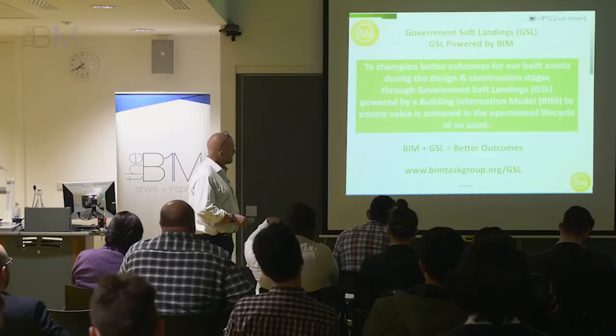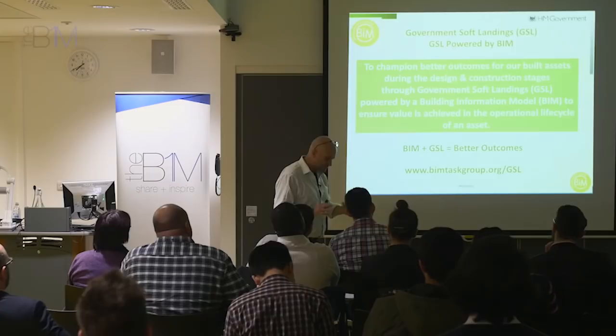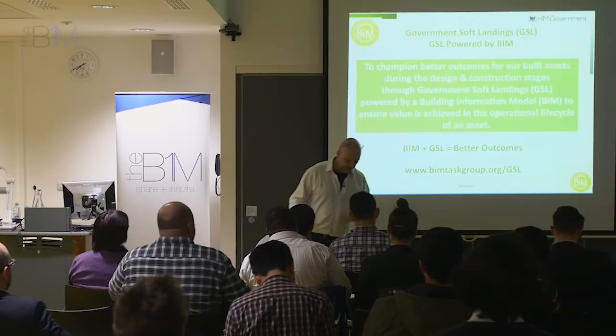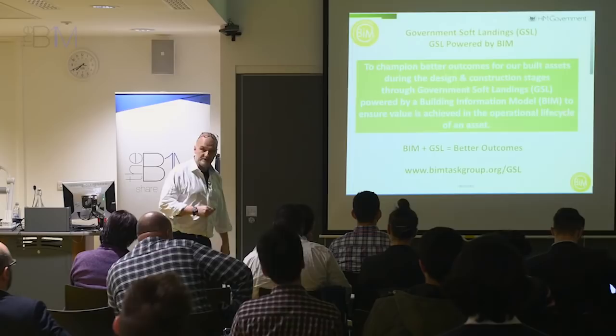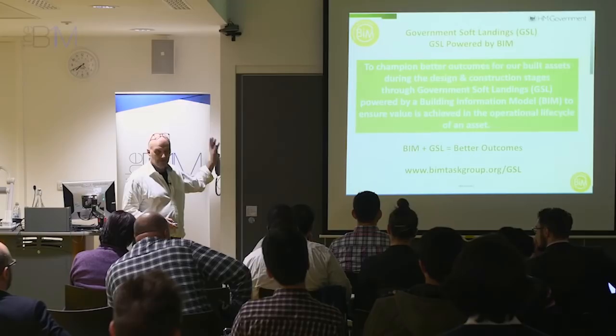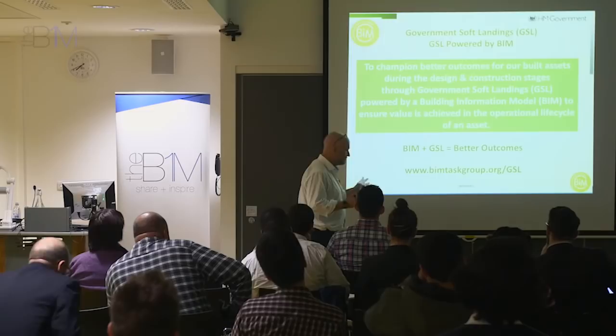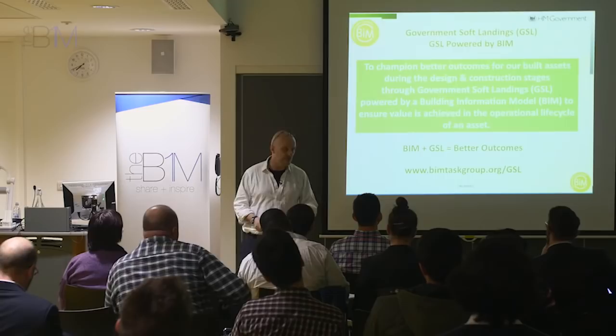Government Soft Landings is something built upon, if you Google BSRIA soft landings, that's B-S-R-I-A. BSRIA soft landings is in effect the forerunner of this, and the government liked it so much they brought it into the UK BIM program. And this actually is the forgotten target, I think, because from 2016 this will be mandatory on public sector projects as well as using UK BIM level 2. And so the requirement will be on your project, if you're working in the public sector, to have a Government Soft Landings champion in your project team, whether that's a client representative or somebody within your team or another stakeholder.